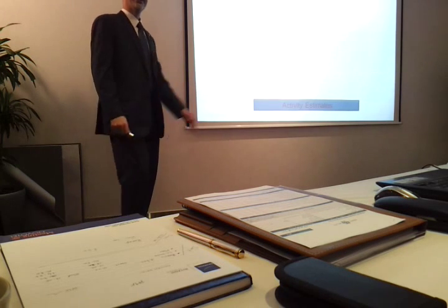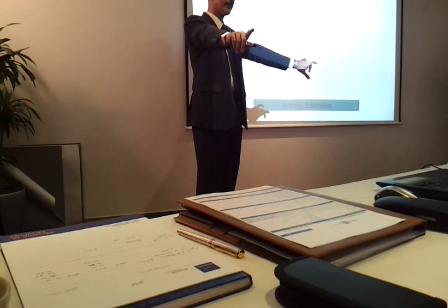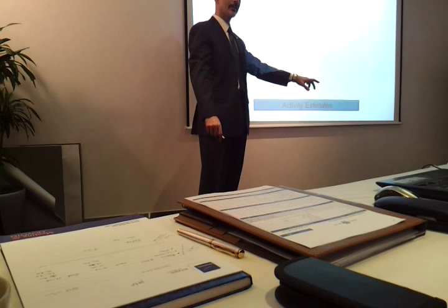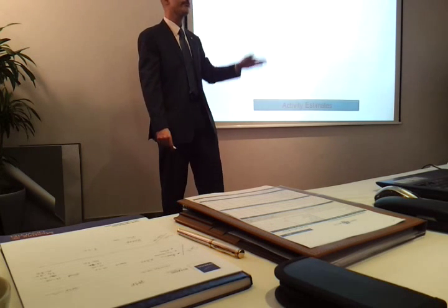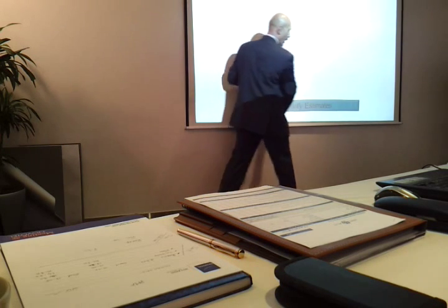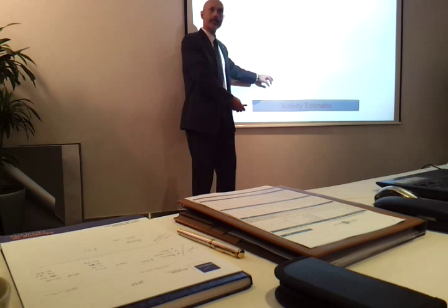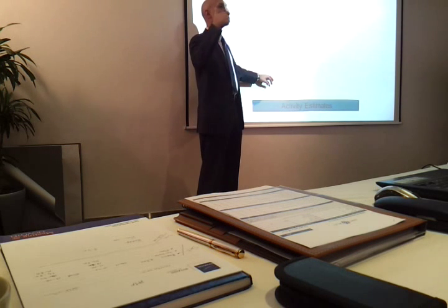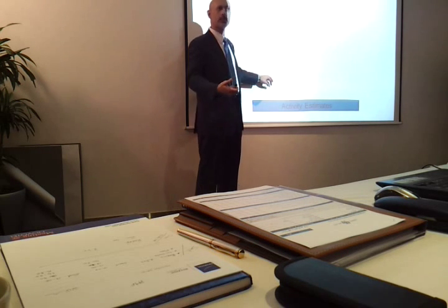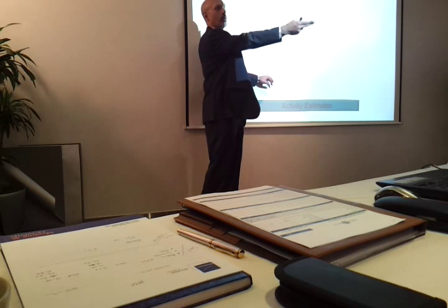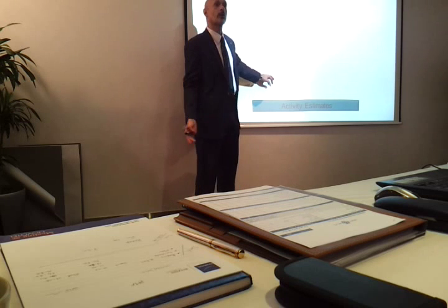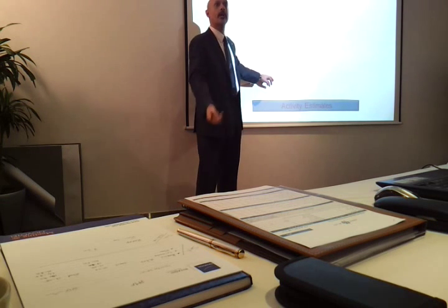So, you start from the bottom line, the work package. But before you know the estimates of the work packages, you have to estimate the activities of every individual work package. So, this is my work package, and you have developed and listed all the activities. You determined what resources are required. You determined the duration for the resources, because if your resource costs 100 riyals per day and I need him for 10 days, it means it's going to cost me for that activity 1,000 riyals. This is how it's worked out.